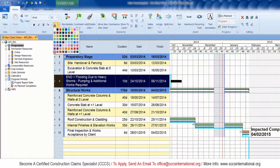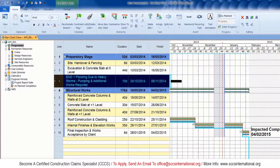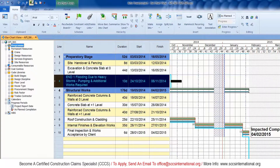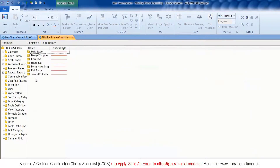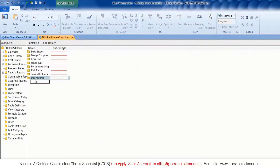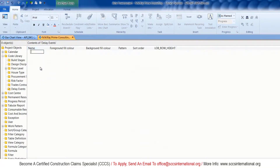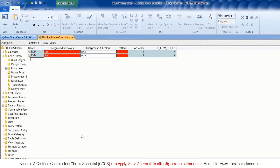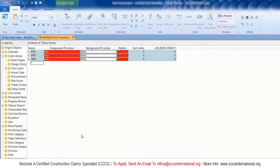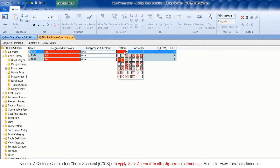Now it's time to insert the duration for the delay event, which is specified in your Excel file — the delay is 10 days. I'll do a bit of formatting and then insert it into the code libraries, defining a new library for delay events. I'll also define new formatting for each type of delay event, whether it's excusable, inexcusable, or compensable.